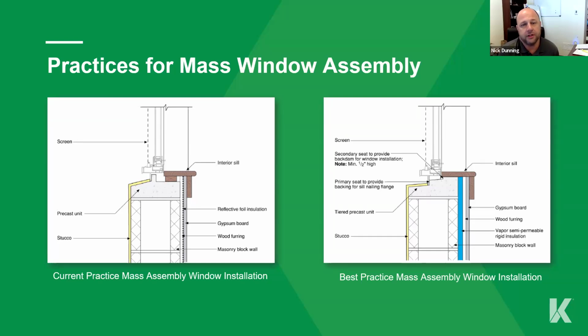But I think the most important thing Hector said was the maintenance. There is no such thing as a non-maintenance warranty. Every system we put on our buildings requires some kind of maintenance. The maintenance not only makes sure it's being cleaned and nothing is accelerating deterioration, it also looks for issues. So if we see the top coat deteriorating quickly, let's go ahead and put a new top coat on. That is a lot less expensive and intrusive than doing a whole new system.